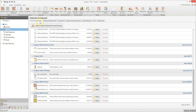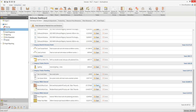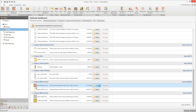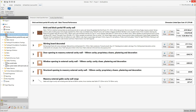From the estimating calculators tab, you can open each estimating calculator and check the specification of each element of the job, swapping resources and updating prices as required. You'll see there's an estimating calculator for the brick and block cavity walls and one for the rendered block walls. Click the open button on the brick and block cavity wall estimating calculator. BuildingWorks now opens the brick and block cavity wall, showing you the dimension linked specified items.